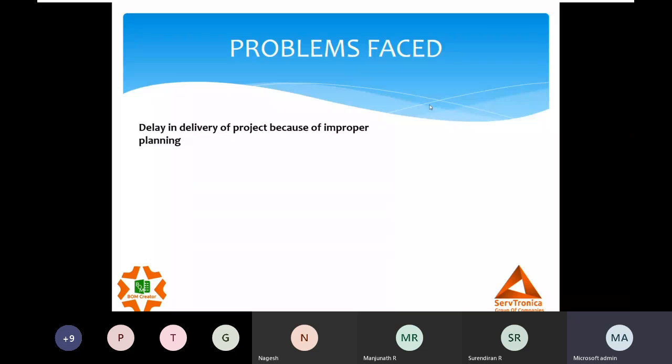The manufacturing component has its own manufacturing lead time, right? A component in a machine can take say 10 days to get manufactured. Another part can take 5 days to manufacture. Another component could take 20 days or 30 days, right? So I need to prioritize the item taking longer time first, and only then do we have the exact timeline.